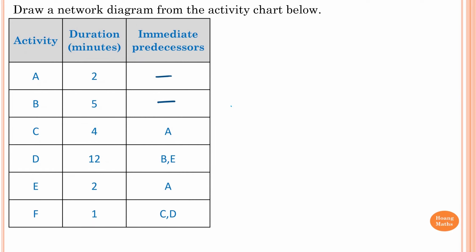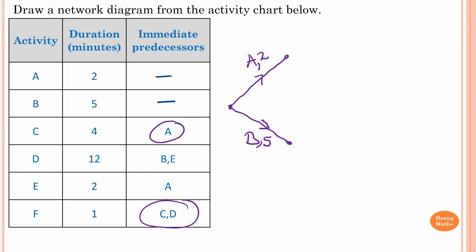For the next example, A and B have no immediate predecessors, so we start like this. Activity A has a weighting of two and activity B has a weighting of five. For activity C, A is an immediate predecessor. Pay attention: since C and D are predecessors of F, activity C and D have a common vertex.